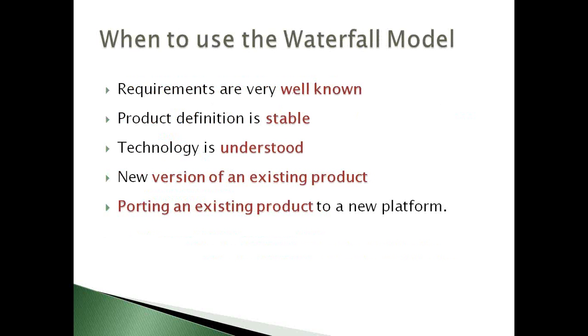So when are we going to use the waterfall model? The first thing is that all the requirements are very well known, the product definition is stable, the technology is understood, and we have the process of revising or changing a new version of an existing product, and then porting an existing product to a new platform.